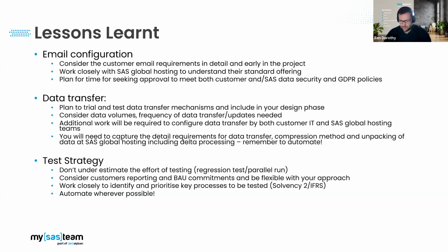So we developed some bespoke tools on this particular project where we could automate the testing between the two environments, which saved us a considerable amount of time had we proceeded with a manual approach. So yeah, they're the three areas that I wanted to mention around lessons learned.